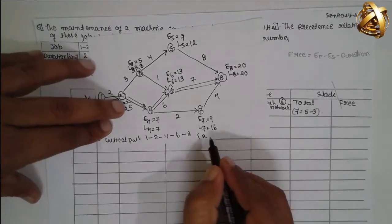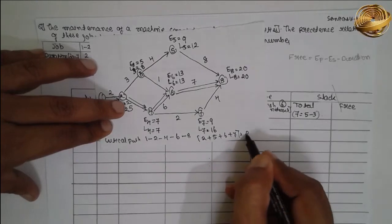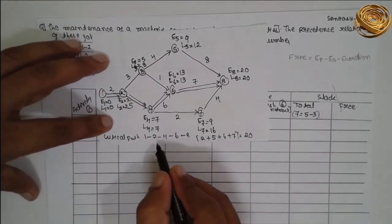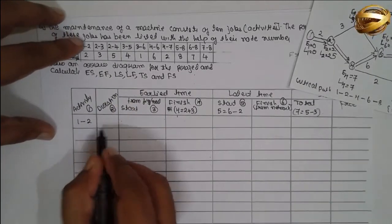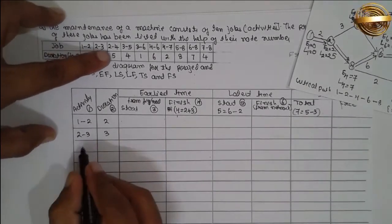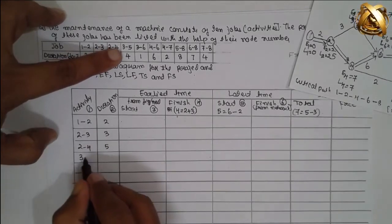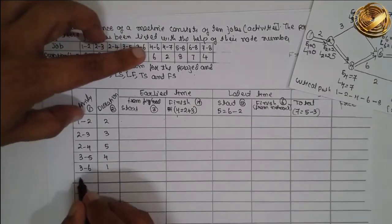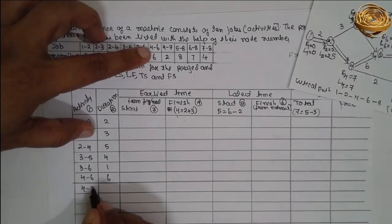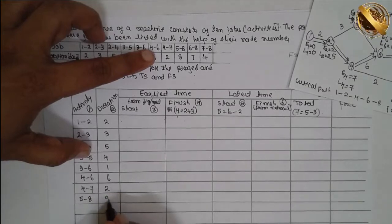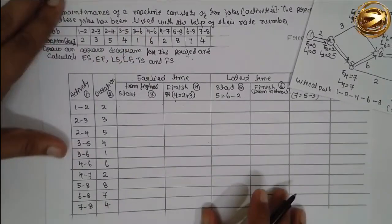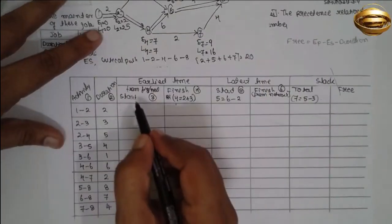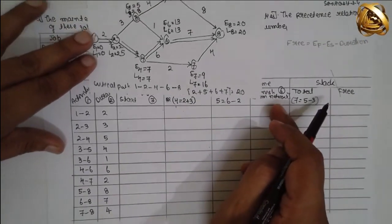Now I will go to the table. First I will write the activities — activities are the jobs: 1-2, 2-2 (i.e., 2-3), 2-4, 3-5, 3-6, 4-6, 4-7, 5-8, 6-8, 7-8. Durations are 2, 3, 5, 4, 1, 6, 2, 8, 7, 4 respectively. We have to write the earliest start time and latest finish time from the network diagram.